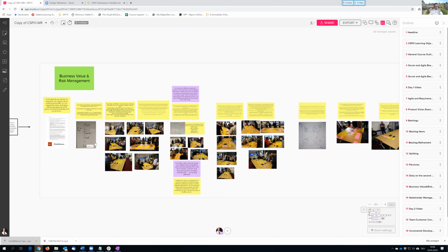So we have then this categorization. So there is an M, S, C, and a W file. We immediately get rid of the W file because won'ts we just don't want to do. We will not do them. Yeah, we won't do them. And we also don't manage them in a product backlog.